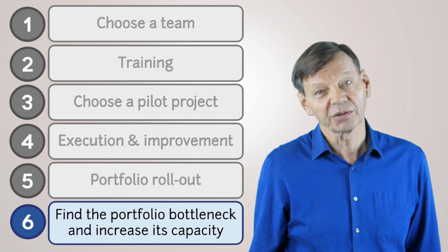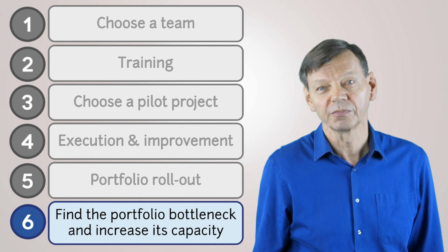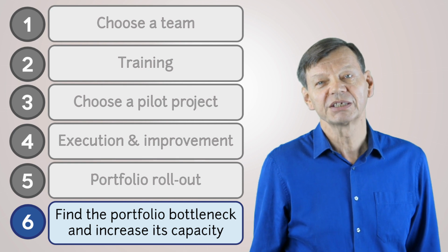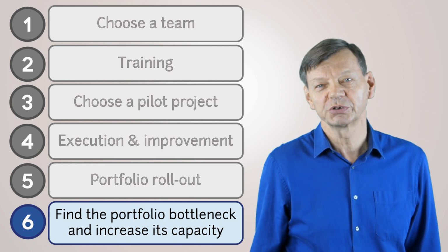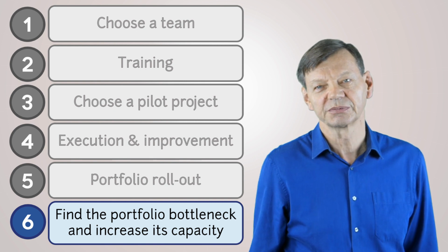This bottleneck can be a department or some equipment like testing equipment or just 2 or 3 key people. Once identified, measures are taken to ensure that the bottleneck resource produces more. A classic solution here is to reduce the bad multitasking of these resources.